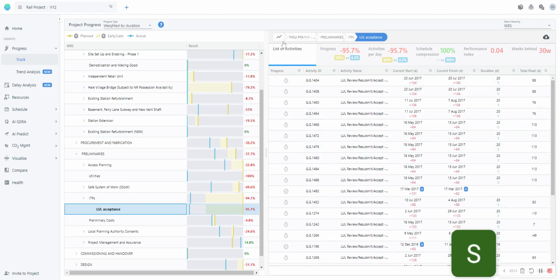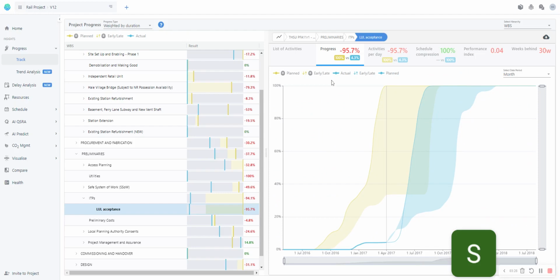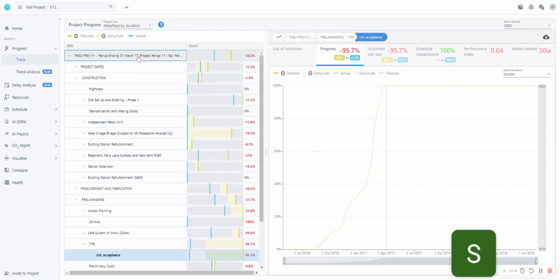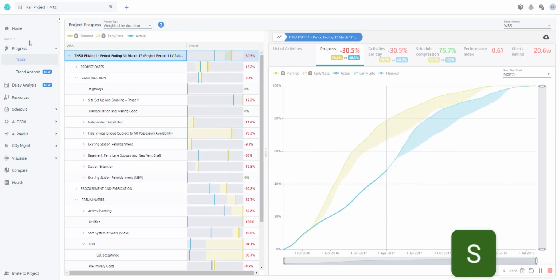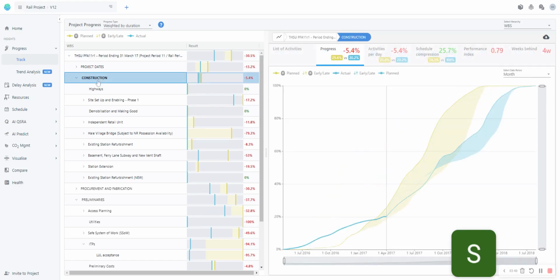And then we have these progress KPIs, as I mentioned, progress versus over time of the baseline and the baseline plan. Now, this is very similar to what you see, I'm just going to go to the top level, what you see on the home page at the project level, but now just by clicking on any level of your project, you can get the S-curves with the baseline plan versus the actuals and the forecast for your project at any level of your project.